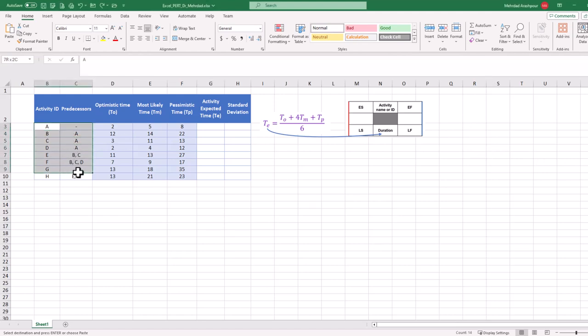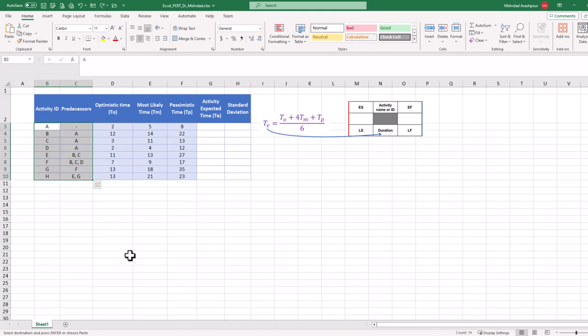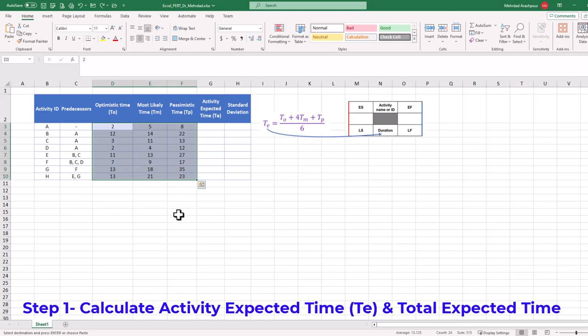Let's start with a small project with 8 activities for which dependencies or predecessors are specified. For each activity, optimistic, most likely, and pessimistic times have been provided. We can follow only 4 simple steps to implement PERT in Excel.